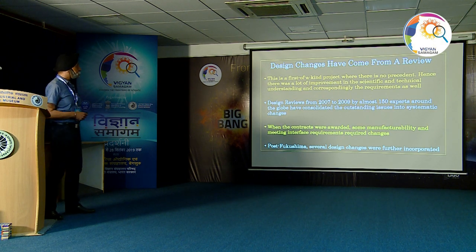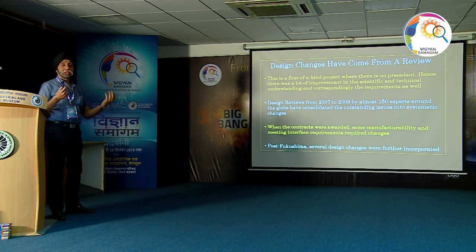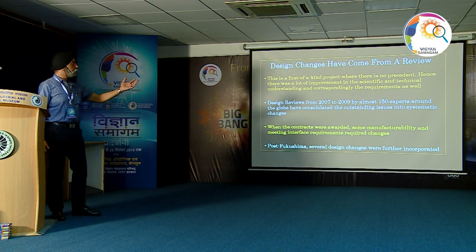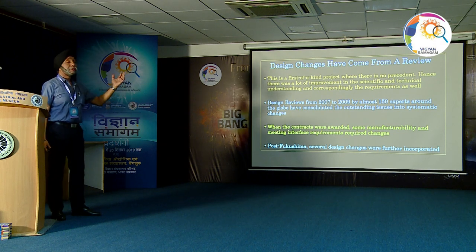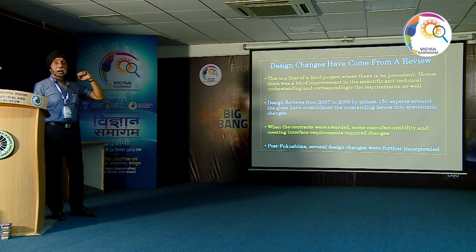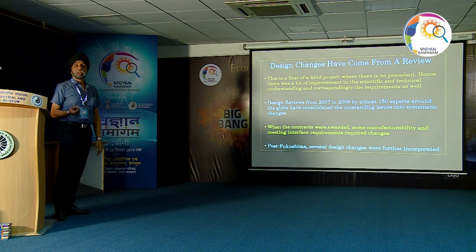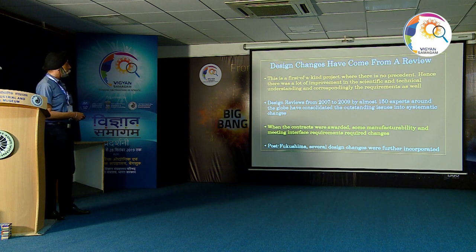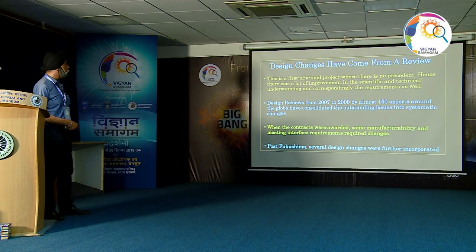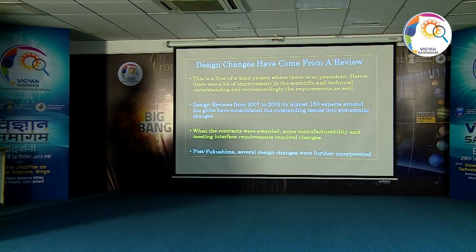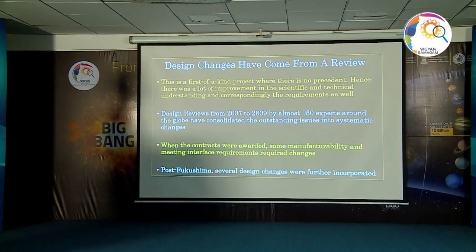After the signature came in and more international experts got involved, about 150 experts from 2007 to 2009 did an entire detailed design review of the plans for ITER and found that there are many outstanding issues which need to be resolved before we build ITER. So there were a lot of systematic changes brought into this design. And when the contracts were awarded, some manufacturability and meeting interface requirements also required changes.